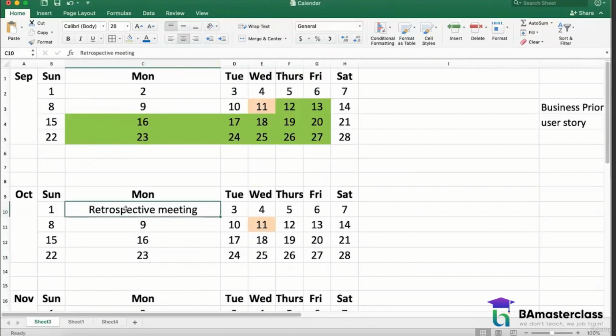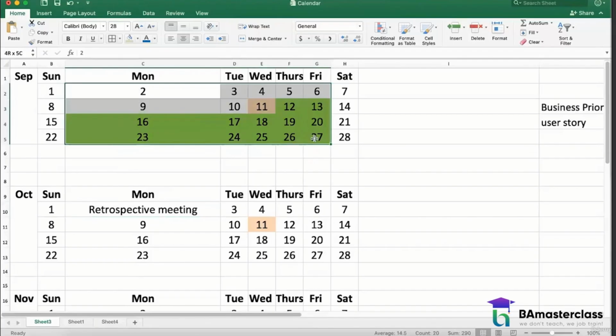To what you've done in the last cycle to see how it's working. Perfect. So on the first day of a new release, I'm going to do a retrospective on my previous month as to what are the things we did well, what are the things we did not do well, and how can we overcome the shortcomings. So let us write this down.